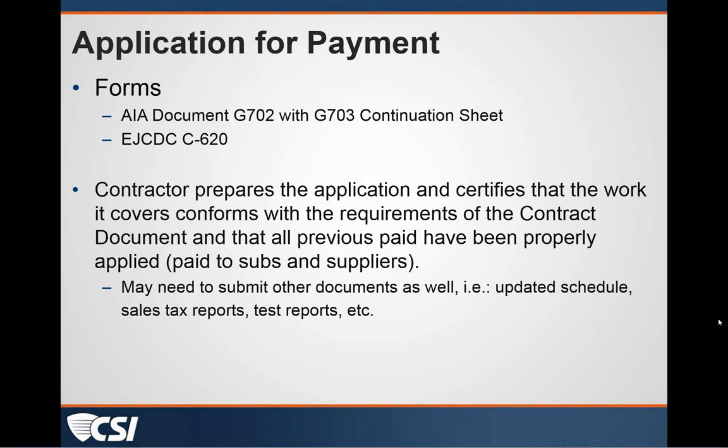With his pay app, he may need to submit other supporting documentation. Typically, we'll ask for an updated construction schedule. You may need to submit sales tax reports, test reports, lead documentation, any number of things that are tied to that pay app to have them at the same time.